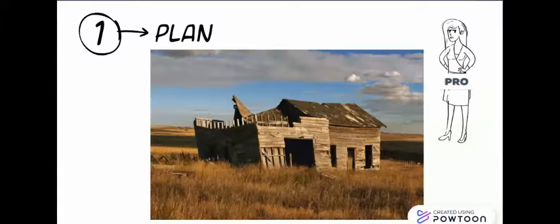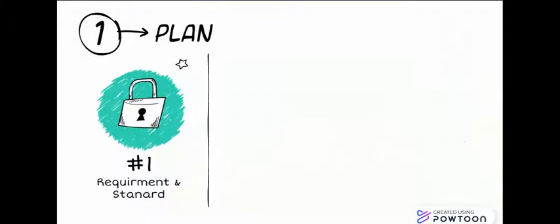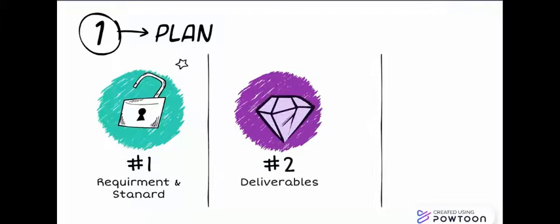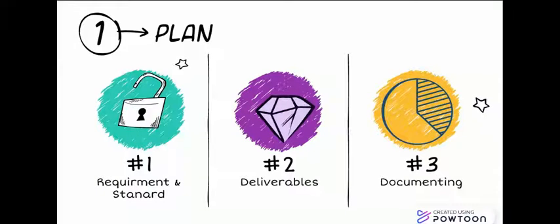Once you have an idea of different concepts, the next step is to complete a project quality management plan. To do so, follow these steps. First, identify the requirements of the quality of the deliverable and how the project needs to be managed. Agree on what information will be delivered and what process will be documented.